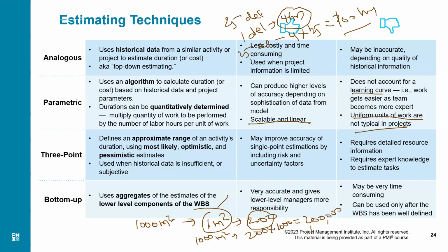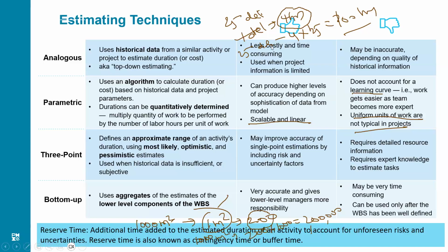First deliverable, while I'm doing it, I'm also learning how to do it correctly. So there could be some mistakes, some reworks. So it will take more time to complete that deliverable, and it will cost me more. But when I repeat it, I have already learned by doing it, so it will take less time. It will cost me less. There will be fewer errors, fewer defects.